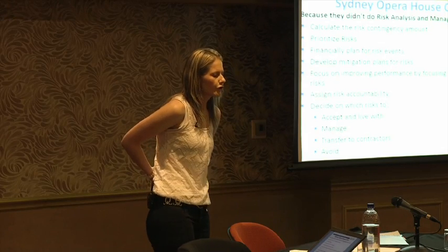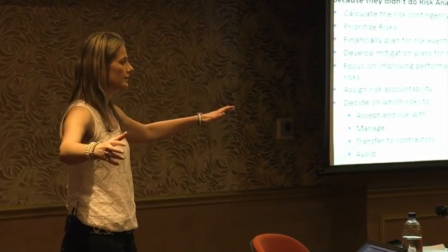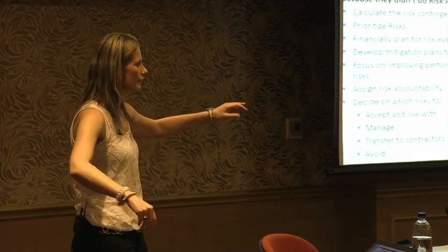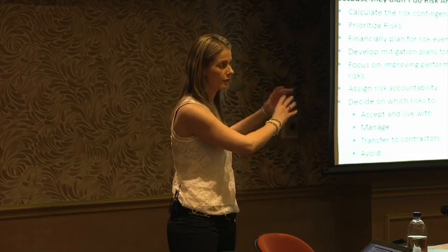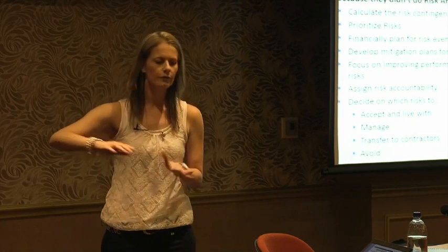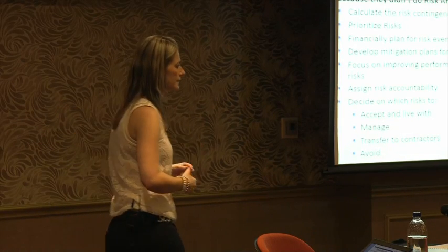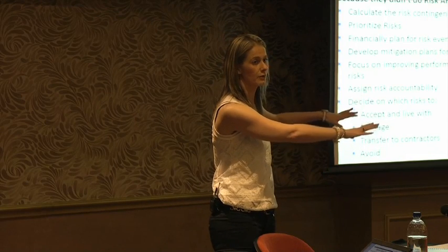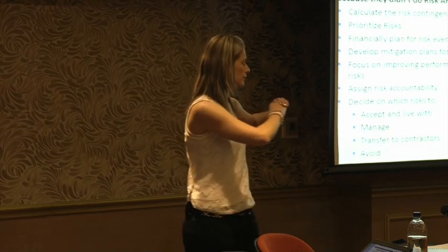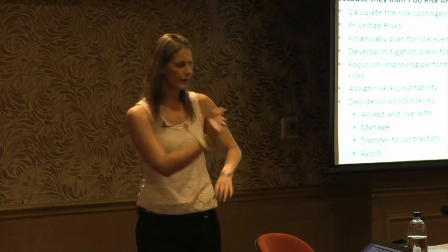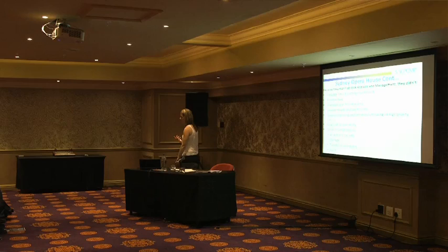No, it's not. So if we could, for example, have two areas where we can build the project, the one might be better from an operations point of view, but it's going to be very difficult with a community there to construct it, where the other one, it's a bit more difficult from an operation point of view, but we won't face that many risks from a construction side. So what the client might say is, well, I want to avoid any unrest within the community, any lease agreements, any disruption to my construction or to site. So I'll rather avoid that and rather construct it here. So there are scenarios where we can try and avoid risks.